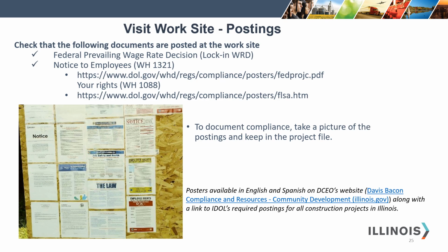Okay, under Davis Bacon, postings at the worksite are required. You should visit the worksite to ensure that the federal prevailing wage rate decision and the notice to employee poster and knowing your rights poster are posted. To document compliance, you need to take a picture of the postings and keep them in the project file. The posters are available on DCEO's website.